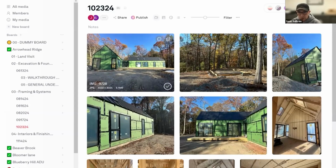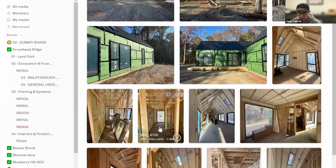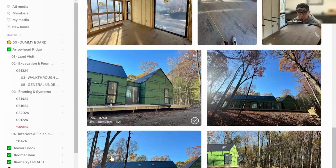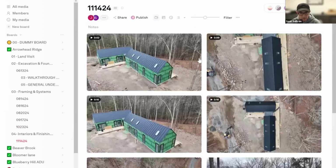And then let's fast forward to about a month later in October. And at this point, the roof's already on, skylights are on, and the rough-ins are done at this point. So all electrical, plumbing, and HVAC are done. And we're already starting to get the sprayed-in foam insulation. So you can see, now within a 3-month period, we're already fully weather tight and fully insulated. So yeah, pretty quick process on this one.